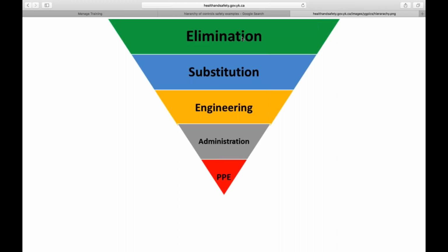So what are we talking about? The name of this module is a site-specific EHS plan, or health and safety plan. What do we know about it? Well, it's going to vary in size. How big is the project? Are we just forming and pouring concrete, or are we doing a complete rehab? Are we doing a complete turnaround or shutdown? Are we just going to do site prep and some land leveling, and be out of there before any equipment and utilities start coming in? Depending on what the work site is and what hazards exist when we're initially there, or while we're there throughout our task, that will often determine how complex the health and safety plan is going to be.